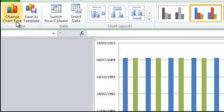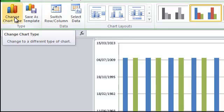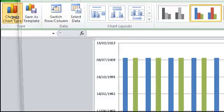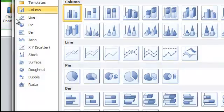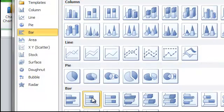I'm going to go up to Change Chart Type on my ribbon, and I'm going to change it to a stacked bar chart.